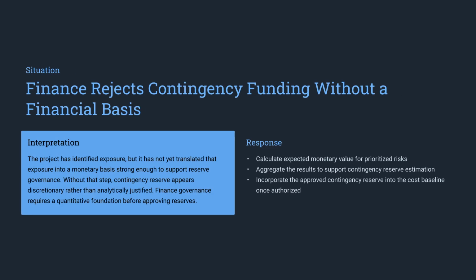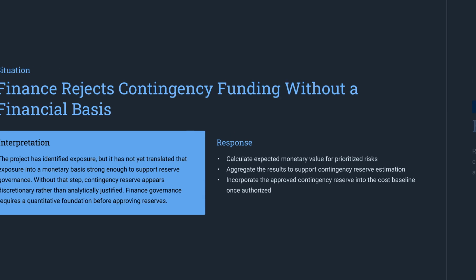Finally, when finance rejects contingency funding, ensure you provide a financial basis. Calculate the expected monetary value for your risks to support your reserve estimations with clear, analytical data.